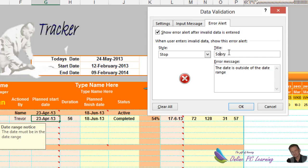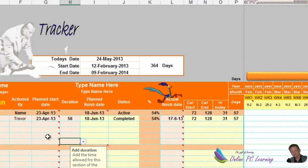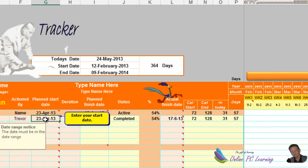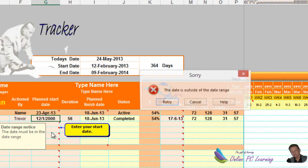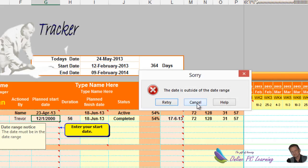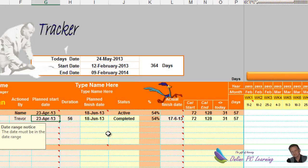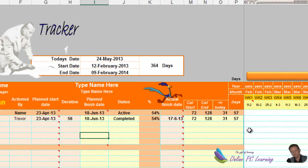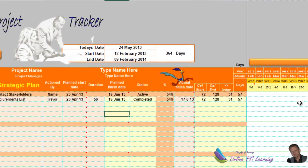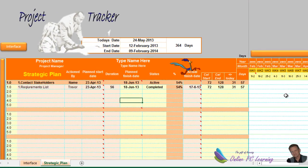If someone tries to type in a date outside the range — say the 12th of the 1st 2000 — it will say the date is out of range and revert to the original date. You can't start something outside your project range.